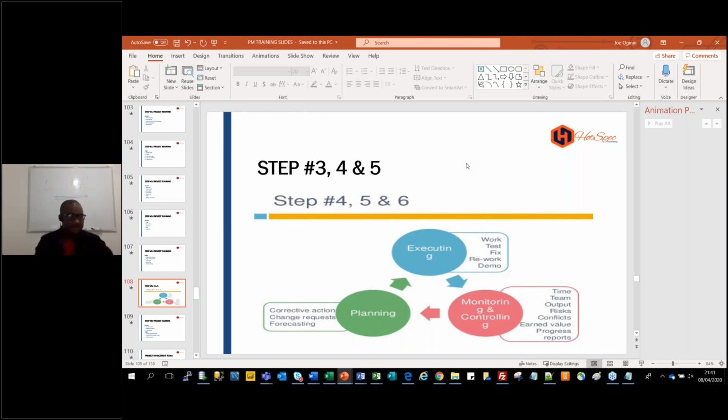So day 3, only 50% is done. You only have 2 days more. How are you guys going to do the rest in 2 days? You've done 3 days, 50%. Do you need any extra days? Because now you have 2 days. Now, do you have enough resources? That's the project manager. Can I give you one more resource?